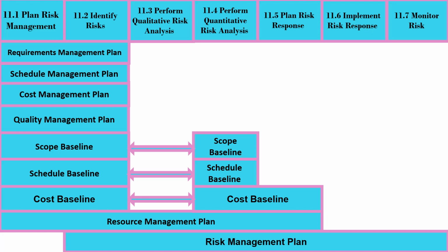They also share scope baseline and schedule baseline with perform quantitative risk analysis, and they share cost baseline with both perform quantitative risk analysis and plan risk response. They share resource management plan with all processes except implement risk response and monitor risk. Identify risks shares risk management plan with all processes except plan risk management.